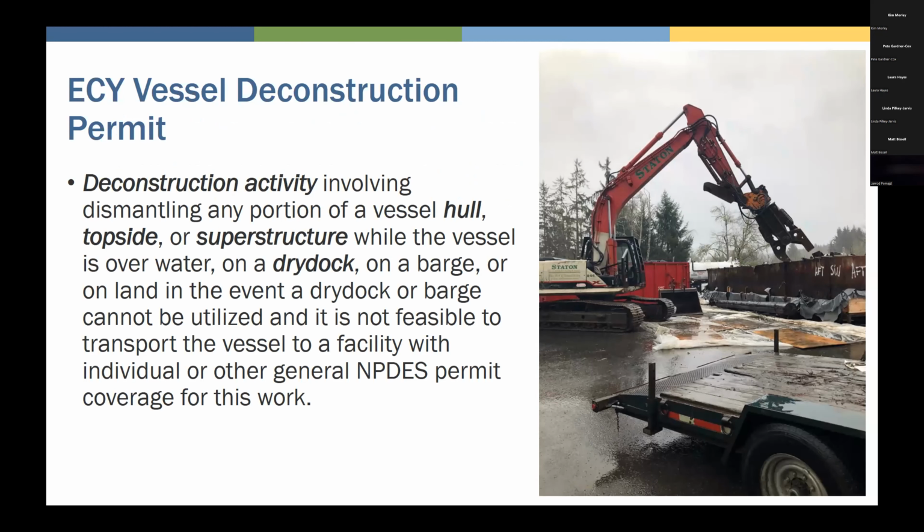In this response, once the barge was in the parking lot, it was then deconstructed. And so Ecology has a vessel deconstruction general permit. And you can imagine deconstructing a vessel is a high risk for pollution activity. And so whenever possible, you'd want to do that in a place that's away from water, so you don't have that potential to release contaminants into the water.